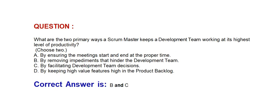Next question: What are the two primary ways a scrum master keeps a development team working at its highest level of productivity? Choose two options. Option A: By ensuring the meetings start and end at the proper time. Option B: By removing impediments that hinder the development team. Option C: By facilitating development team decisions. Option D: By keeping high value features high in the product backlog. Correct answer is Option B and Option C: By removing impediments that hinder the development team, and by facilitating development team decisions.